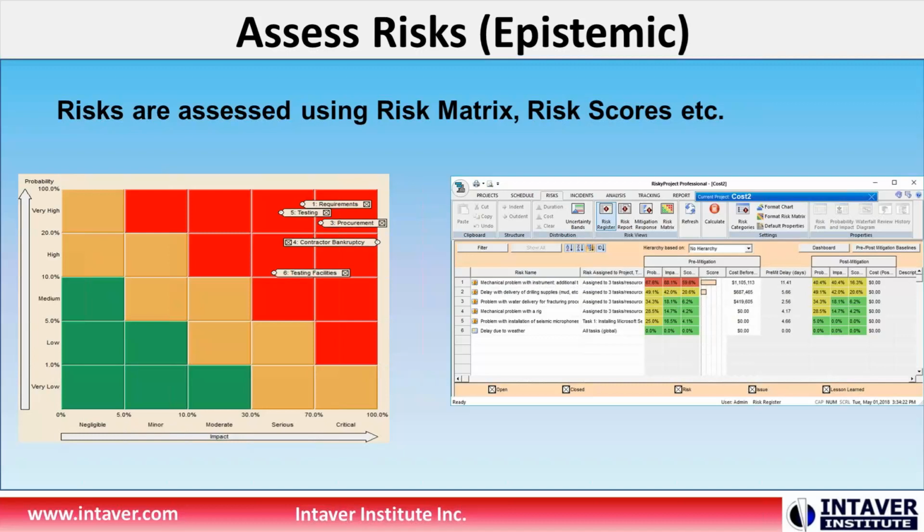Generally, if they occur, they cause a sudden, abrupt change in the state of your project. You will suddenly see a big delay. In the next one we'll be looking at uncertainties, which are a natural variance that occurs that don't cause these big shifts, but do cause a gradual deterioration of the project.